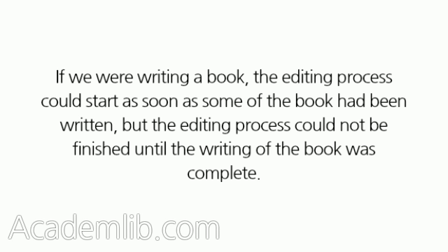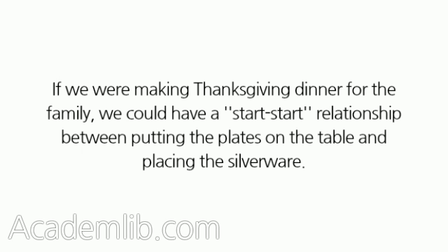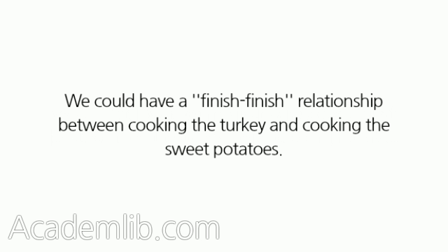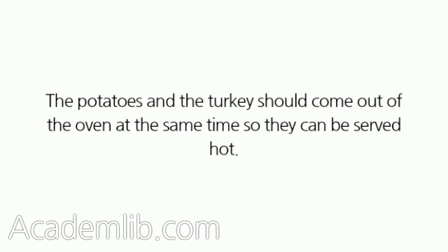If we were writing a book, the editing process could start as soon as some of the book had been written, but the editing process could not be finished until the writing of the book was complete. If we were making Thanksgiving dinner for the family, we could have a start-start relationship between putting the plates on the table and placing the silverware. We can't tell where the silverware goes until at least some of the plates are placed on the table. We could have a finish-finish relationship between cooking the turkey and cooking the sweet potatoes. The potatoes and the turkey should come out of the oven at the same time so they can be served hot.